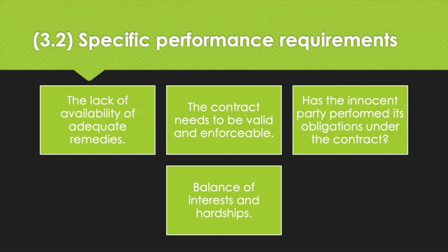Has the innocent party performed its obligations under the contract? The courts will consider to what extent the innocent party has performed, or is willing or able to perform, its obligations under the contract. And the balance of interest and hardship. As specific performance is seen to be an equitable form of remedy, the aim would be to return the parties to a position where they would have been had the contract been performed as intended.